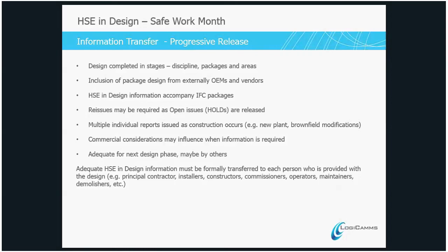So that was back to that previous comment about ensuring that we understand, from the design perspective, when our hazards and risks are being transferred to constructors and other duty holders, that we're talking to them as early as possible about when they're going to get that information, so they don't potentially use that as a commercial tool against us in a contract situation. And then what's adequate for the next design phase.